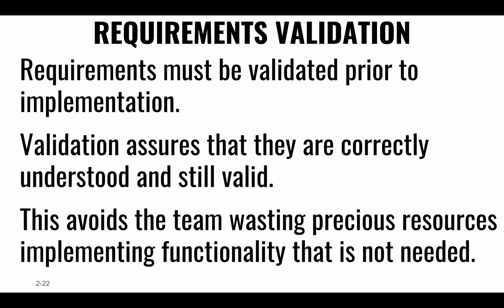Validation. As folks give us requirements, one of the things that is very important is that they provide an objective way that we can validate that we have achieved that requirement. Right? An objective measure that we can perhaps even implement as an algorithm, or maybe as a unit test, or some user interface test that validates that a particular requirement has been fulfilled.